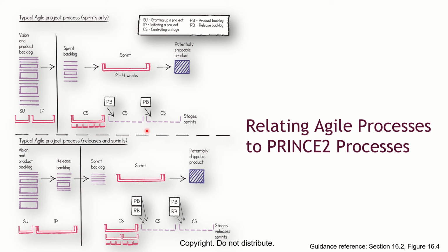So it means that it is not only the carcass that will be done. There will be plastering of the inside. There will be window fittings being put there. Okay. There will be security, if you need to have security, round that ground floor to protect it from people having access to it. That is release. Release is making a product or a service available for use. Did you get that? So make it available for use is release.